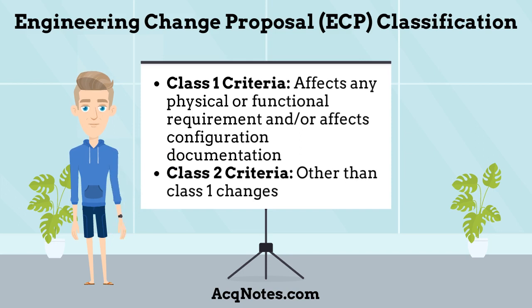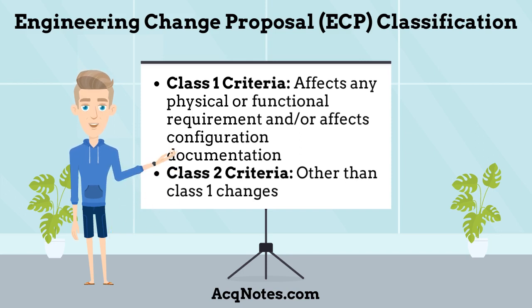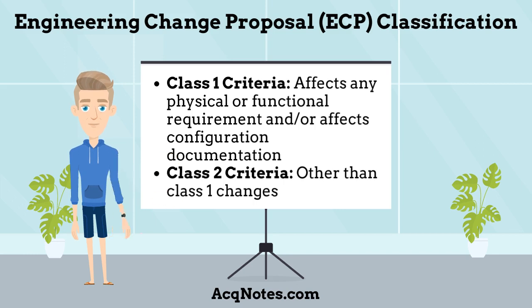1. Affects any physical or functional requirement in the configuration documentation. 2. Affects any cost, warranties, or contract milestones. And 3. Affects any approved product configuration documentation.